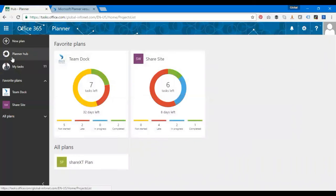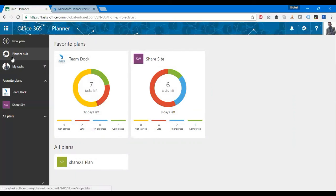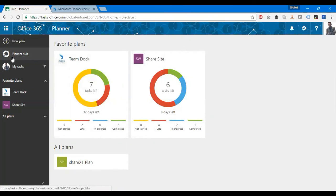What's the final decision? Do I have to start using Microsoft Planner or stick with SharePoint task web part? The choice depends on the following scenarios. Use Microsoft Planner when you're managing small projects, when there's no requirement for managing resources or capacity, no requirement for integration with Microsoft Project, no requirement for integration or sync with Outlook, no requirement for setting up task dependencies, and for projects where social collaboration is more important than formal project management methodology, and for agile scrum projects.